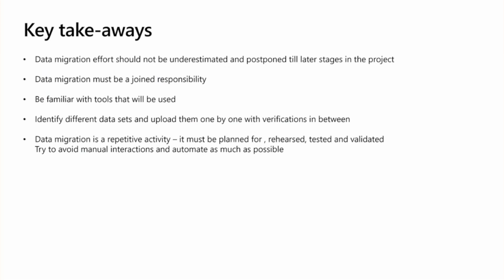Typically, the only person able to extract data from the legacy system is your customer. But on the other hand, knowing how to upload it into the new system is knowledge that you as a partner have, and you need to bring those two worlds together; it is a joint activity. Once you have uploaded your data into the new system, the validation of the data, of course, is again something that the business users from the customer need to do.